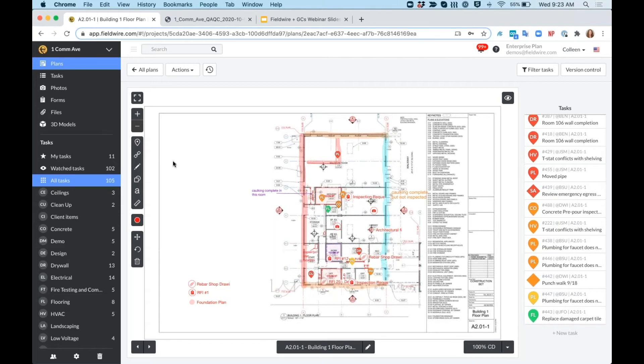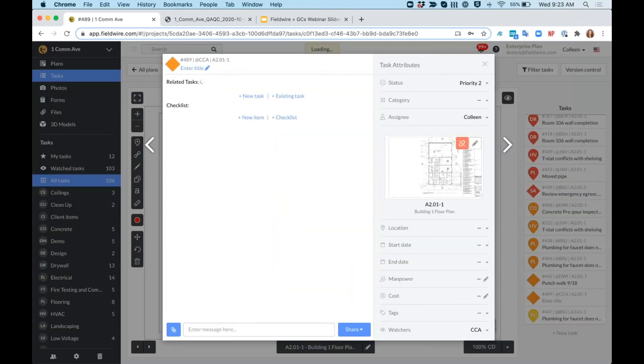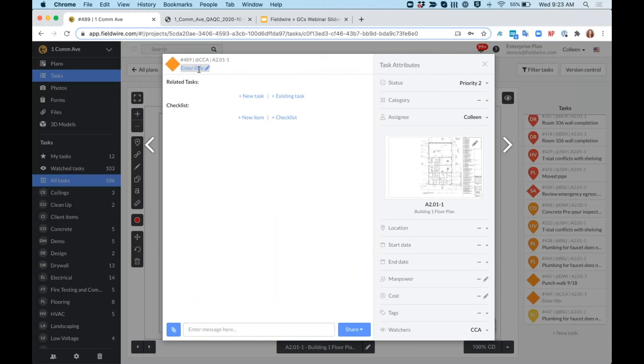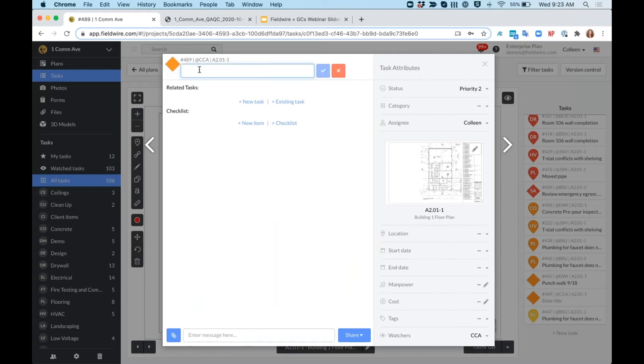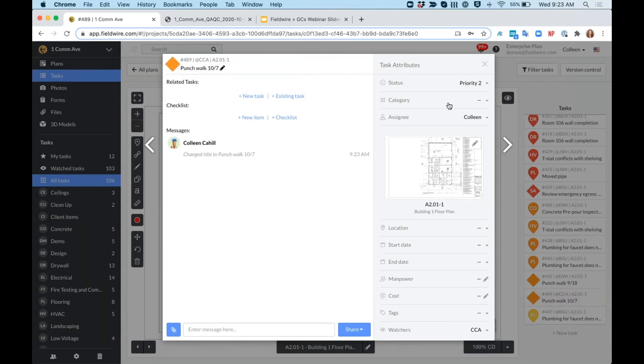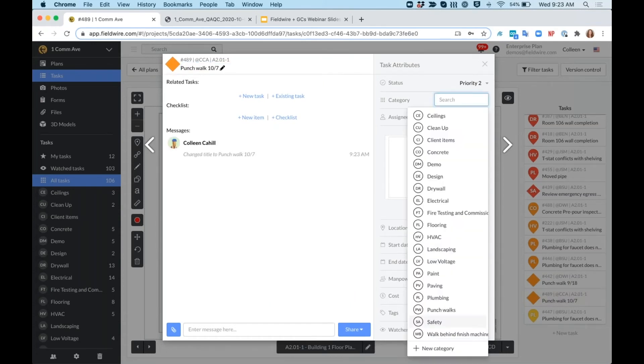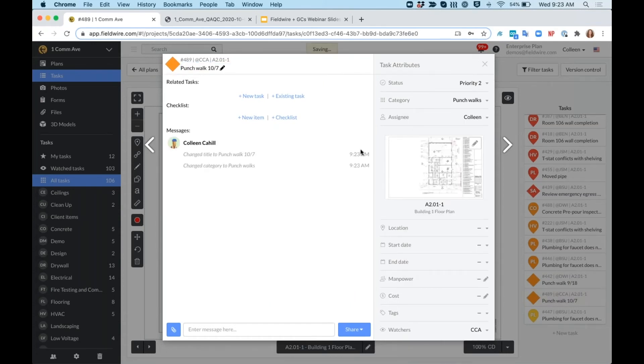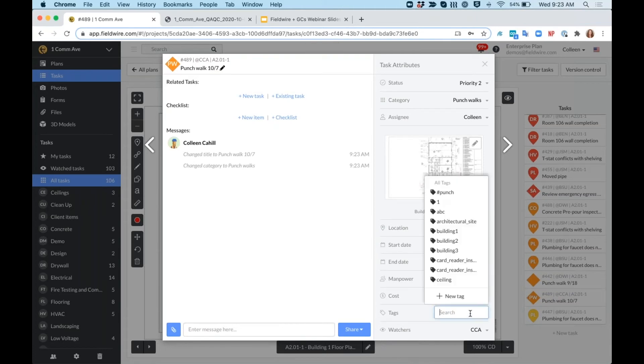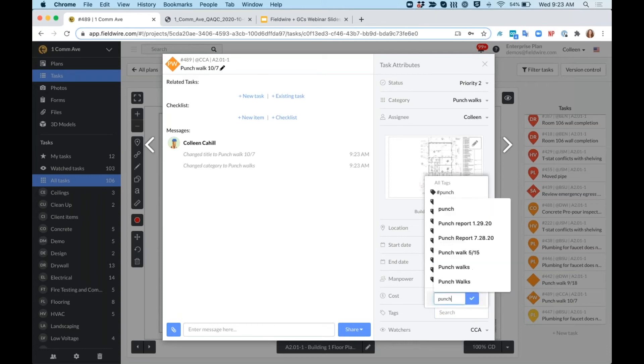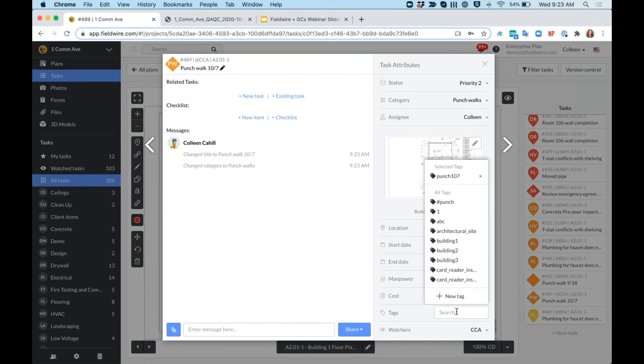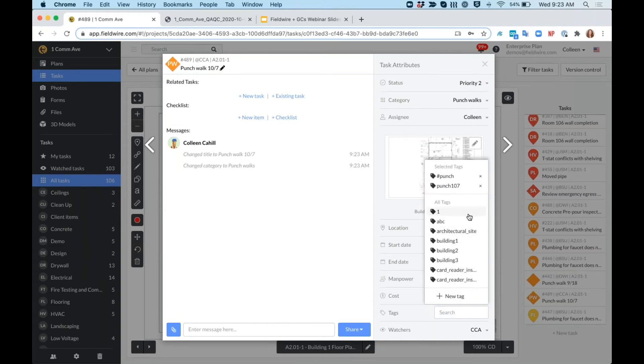So to do so, rather than clicking my pin up here, I'll click plus new task on my sidebar. You can see that this is a diamond task because it is associated with the plan as a whole, and I'll call this punch walk 10-7. I'll add this to my punch walk category since this isn't associated with a single trade. I'll add a hashtag here that we'll call punch 10-7 so that I can filter to everything that's from this punch walk, but then I'll also just add the punch tag here as well.